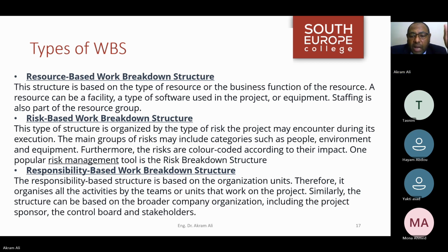So I will also have an organizational breakdown structure or resource-based work breakdown structure, and I need to make sure my work breakdown structure and organizational work breakdown structure are actually overlapping. Because if I need a certain resource and it cannot be made available for the work breakdown structure, especially when I start to apply the scheduling and determine the time when it needs to happen, then I have a problem.